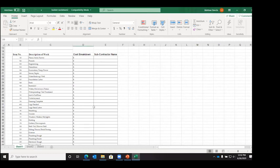Now let me back up a little bit and mention something. Typically, cost per square foot, when we looked at those national averages, does not include things like land, septic, well, power, furnishings, landscaping. Your construction cost is purely the construction of the home on the property, because you're going to have those site improvement costs and that land cost no matter what kind of home you build. And so when we talk cost per square foot, I want to make sure I mention that we're talking purely about the cost of the home, not the improvements to the land, because you would have those costs whether you were putting a fifth wheel camper up there, or building a custom home, or putting any type of structure up there.